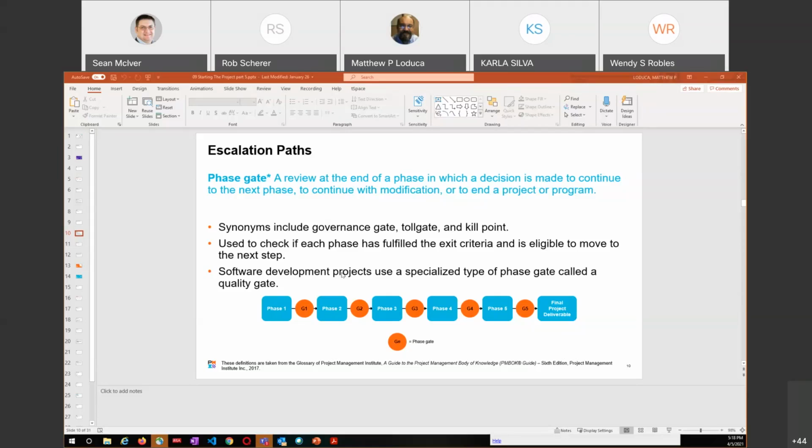But there's a point where you have maybe 2, 3, maybe 4 iterations, and you come to a release point. Especially when you're doing continuous deployment stuff. And when you get to that release point, that would be a phase. You would have a decision gate there. Okay, hey, we're done with these stories. We've demoed everything for the customers. They said everything was all right. We went through our acceptance criteria.